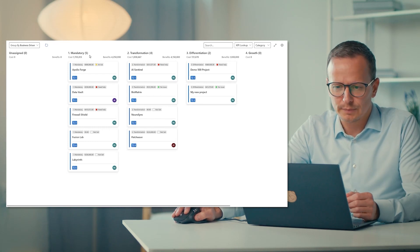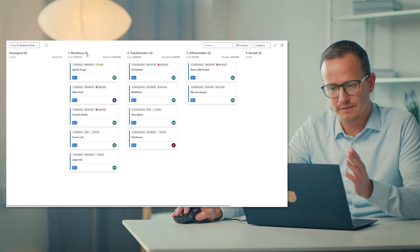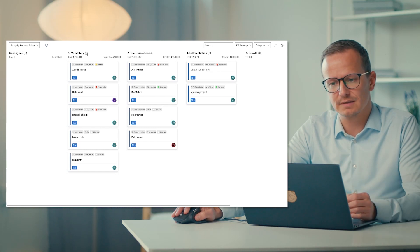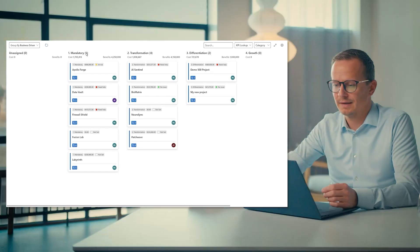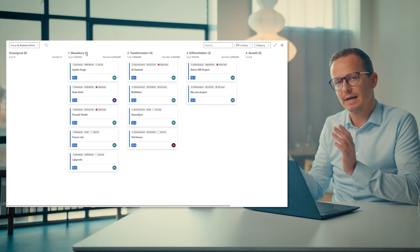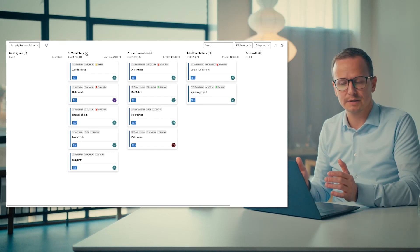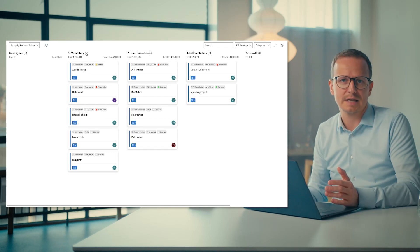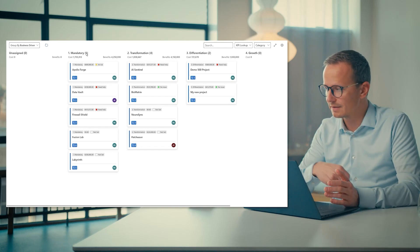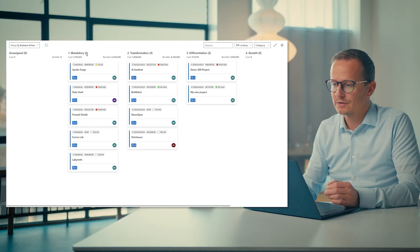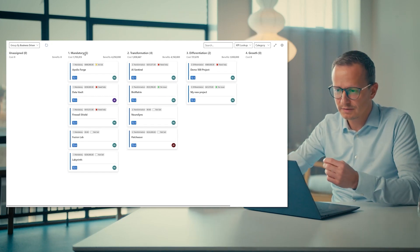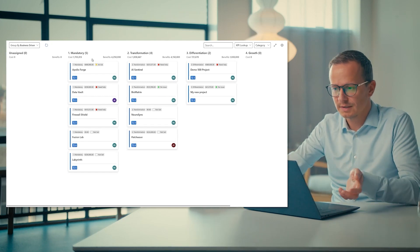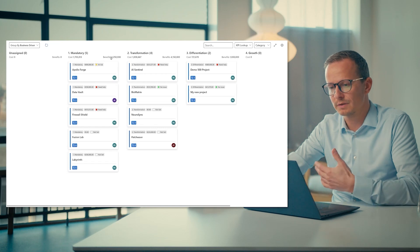And the small parenthesis in the middle here, or at the end of the name, represents the work in progress right now, so the WIP. And some companies work with WIP limits. How much work can we actually have going on at the same time within a portfolio or within a business department or similar. So work in progress we have here, cost and benefit perspective, and all in real time.